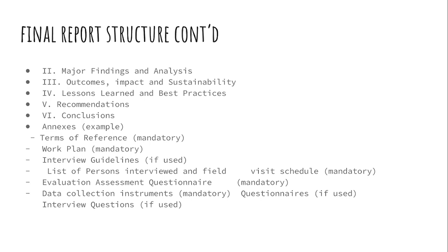Then annexes. Attach the terms of reference, which is mandatory, your work plan, which is mandatory, the interview guidelines, if you use any, the list of persons interviewed, and the field schedule, mandatory if you interviewed any, the evaluation assessment questionnaire, mandatory if you use the questionnaire, the data collection instruments, any other you've used, are mandatory for you to attach in your final report structure. So that is it about the Inception Report.